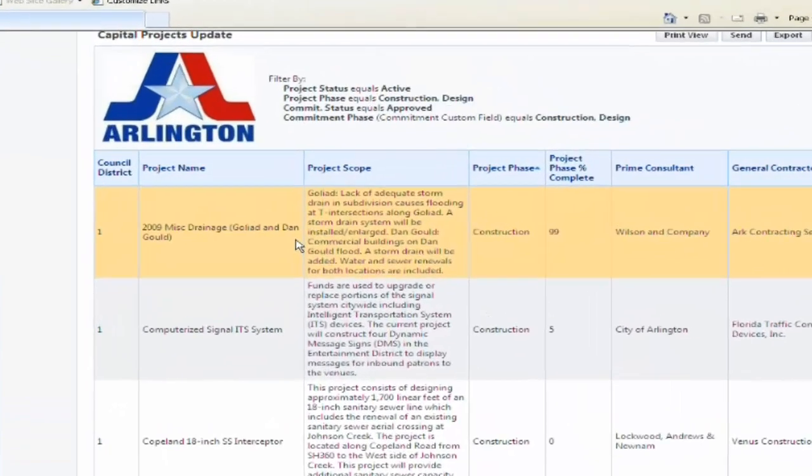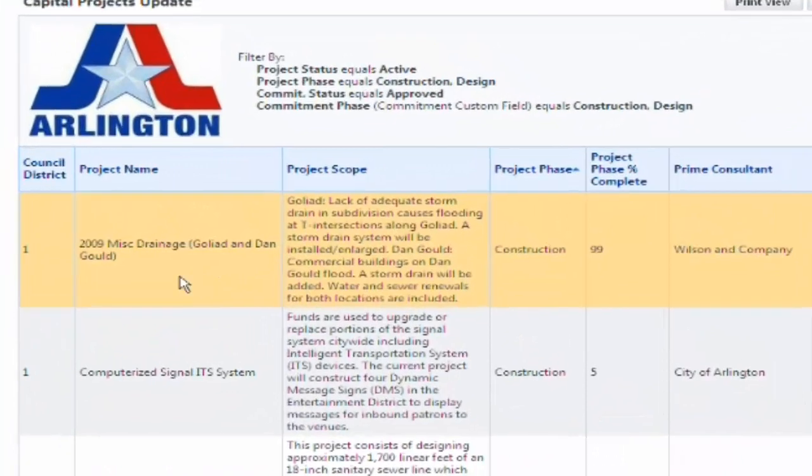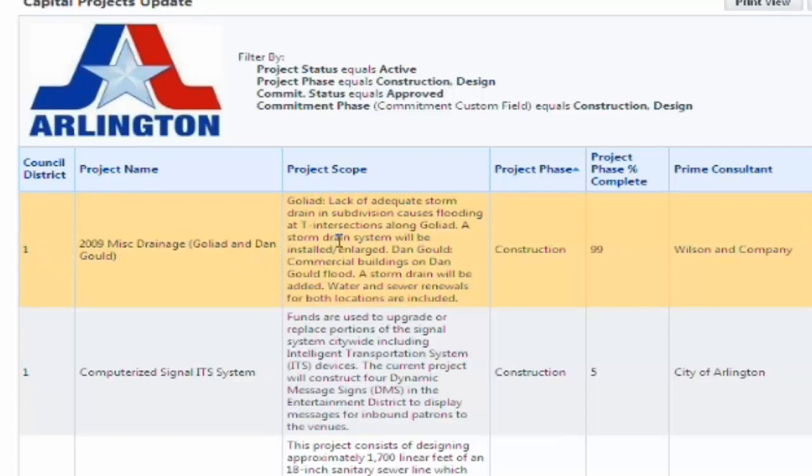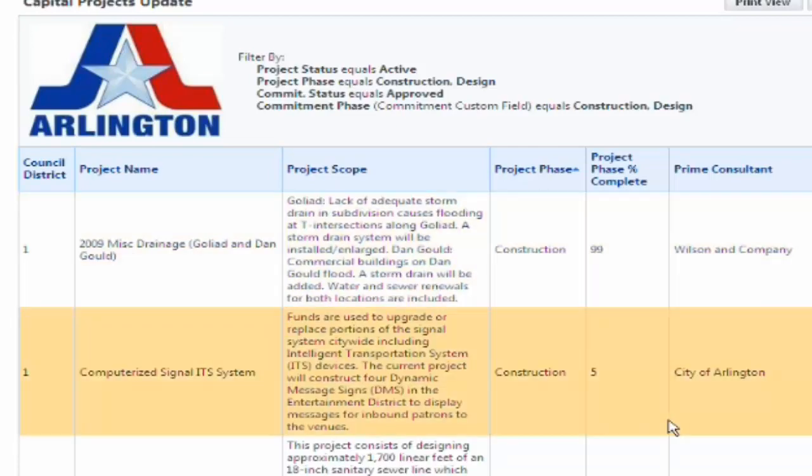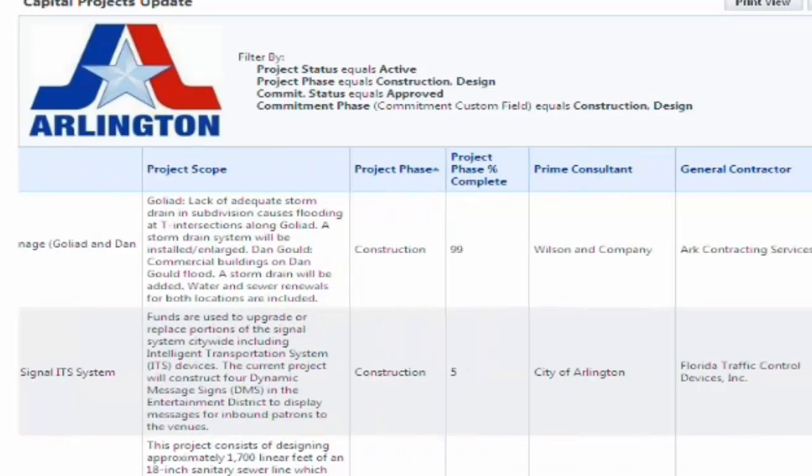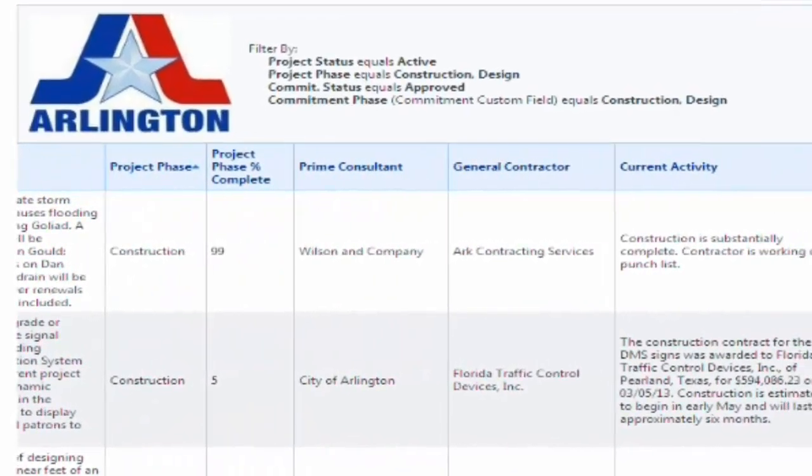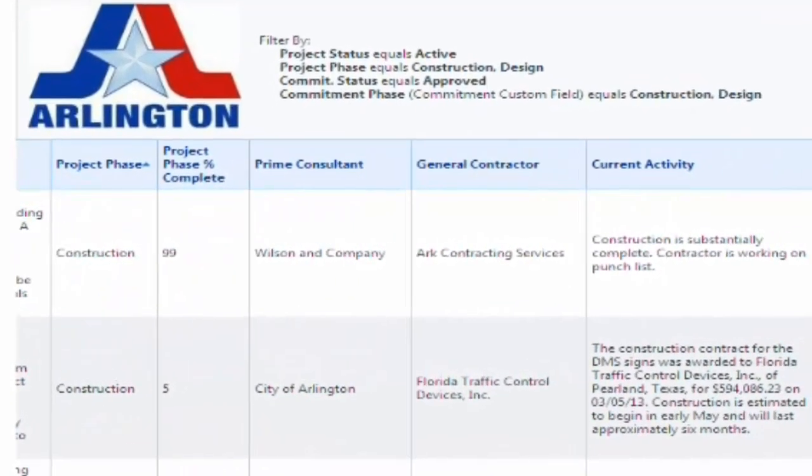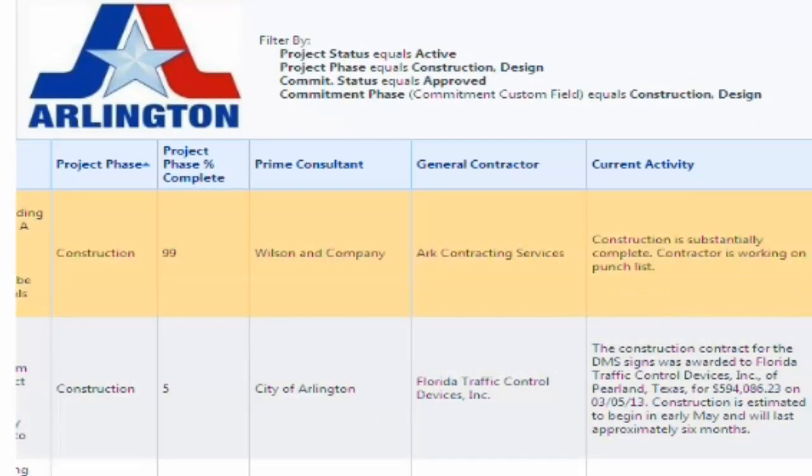This is actually the report that goes to our City Council monthly, sorted by council district, the project name, the project scope. These all come from the detail screen, the project phase, percent complete, our consultant contractor, the current activity, and some information on funding.